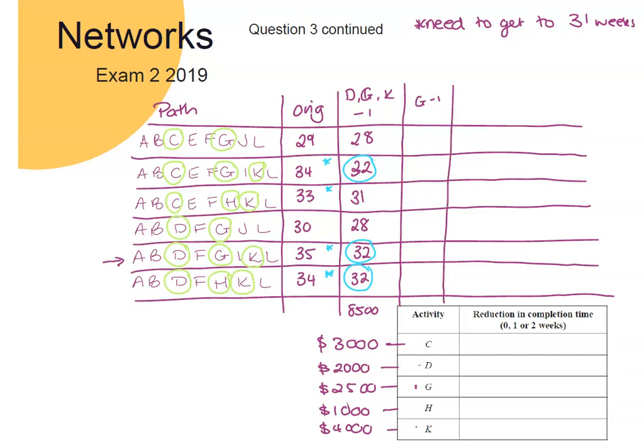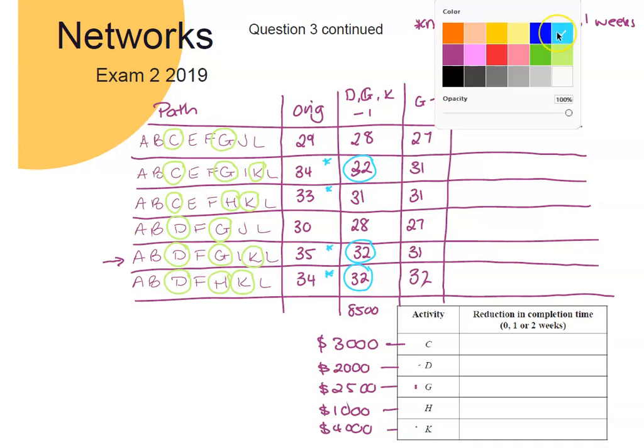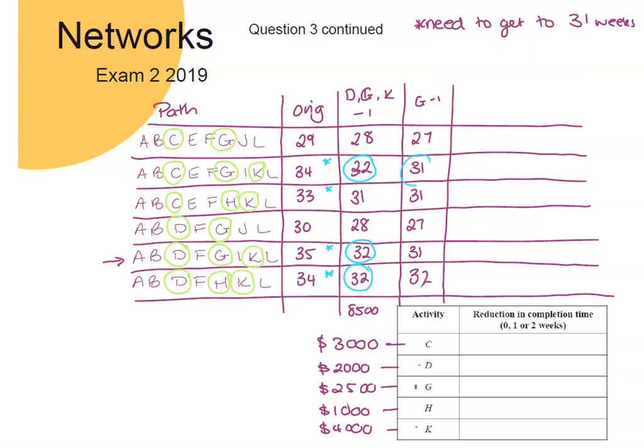Okay, so again, that will bring this pathway down 27 because it has a G in it. It'll bring this one down to 31, which is what we want. Path 3 won't change, but that's okay. It's already at 31. Path 4 will come down another one. 5 will come down another one to our target. And path 6 won't change. So we just need one more alteration to get us to our target of 31. Okay, so we're there with these three, and it's just the sixth path that is still a problem.